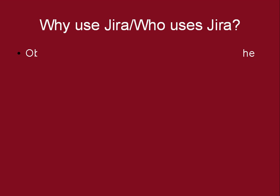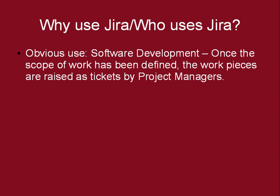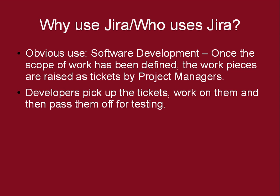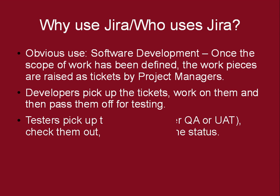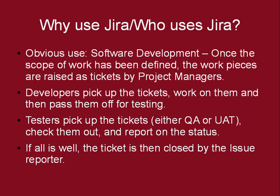Why use JIRA, and who uses JIRA? Well, the main use is software development. Once the scope of work has been defined, work pieces are raised as tickets by project managers — parent tickets underneath which subtasks could exist. Developers pick up the tickets, set to work on them, and when they're done, they pass them off for testing. A tester would come along, do their tests, and say either that's accepted and the ticket can be closed or deployed, or it needs to go back to developers for further work. If all is well, the ticket can be closed by the issue reporter. In JIRA, there is very much an individual-based system — an individual reports an issue, and an individual picks up the issue and resolves it.